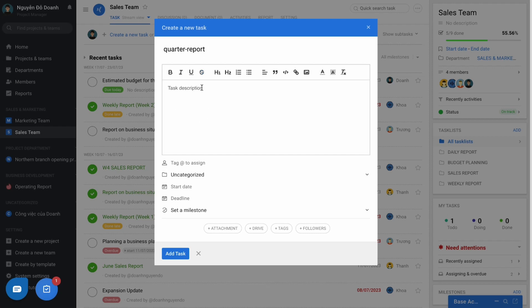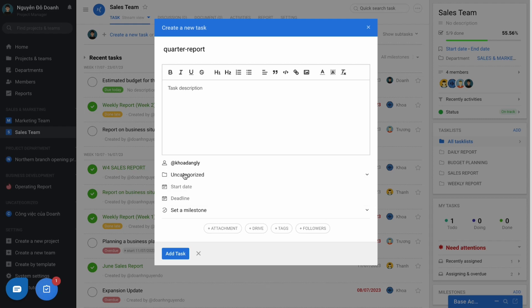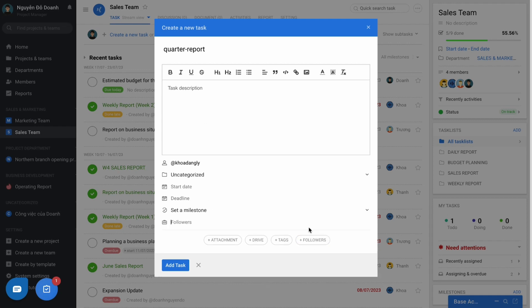Task name, task description, task being added to assign to someone. And note that a task is only assigned to an individual responsible. In case there are many people involved, please add the rest as followers.